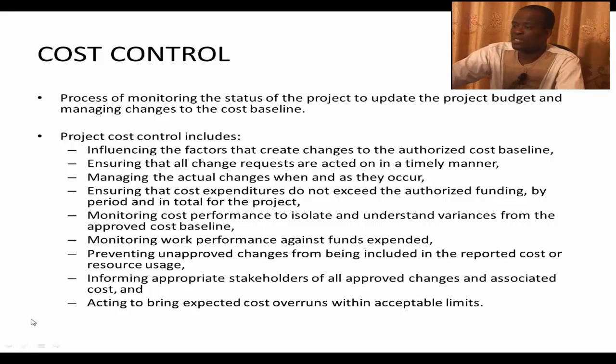mechanisms. So the process of monitoring the status of the project to update the project budget and managing changes to the cost baseline is cost control, and it includes the following: influencing the factors that create changes to the authorized cost baseline, ensuring that all change requests are acted on in a timely manner, because again, changes in projects are inevitable.